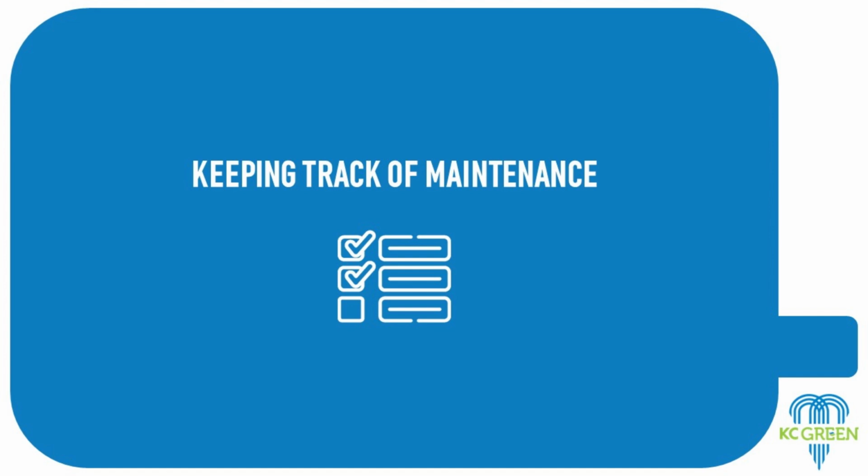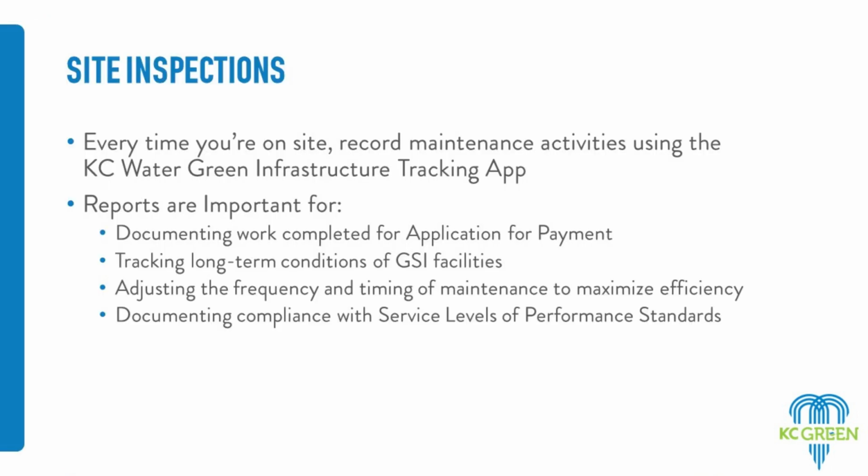Yeah, so the important thing to note about the app is this is going to serve as your documentation with your pay application. So hopefully this makes it really easy on the paperwork side of things later, because you're just going out there and entering the work you're doing in the field and taking pictures, and the rest of it is automated. It's going to automate reports that show all the work that was done at each site that you're at on the back end that you can just attach to your pay application for payments. So that's kind of the idea. We were trying to make it easier in the field and easier on the paperwork side of things, but also have good backup documentation of photos to document the work that you're doing, and then the city knows the work that you're doing as well.